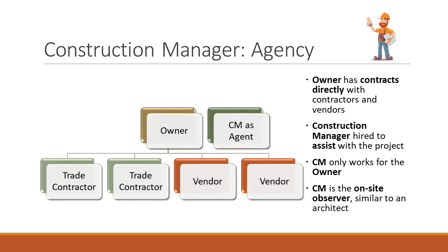So if you're in that same conversation that I described about the multi-prime model, and your owner says, we did this before, we can do this, we really want to do it multi-prime, and they don't budge, what you say is, well then you need to hire a construction manager as an agent, someone to assist you, looking over your shoulder and making sure that everybody is keeping on schedule, keeping on budget, and that the work is being done properly. And that's what the agent's job is here.